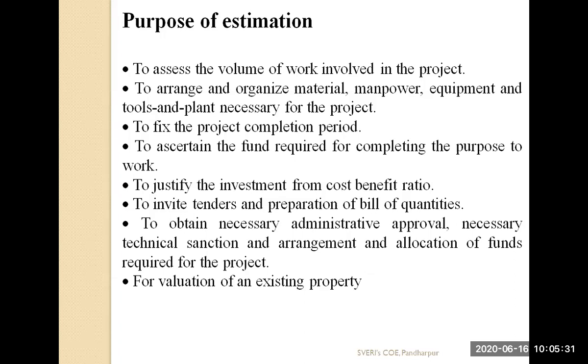To justify the investment, that is, our benefit cost ratio should be greater than 1, to get that benefit we again require the estimate. Again, to invite the tenders and prepare the bill of quantities, we require the estimate. Then to obtain the administrative approval and necessary technical sanction, again we require the estimate. And for valuation of any property, it may be an existing property or an open land, it is mandatory that we have the estimate with us. So the purpose is very important for us to know.